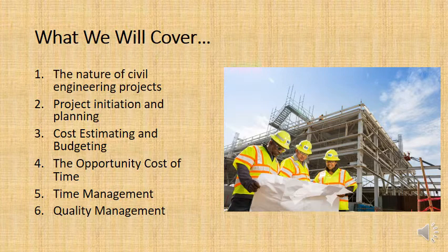And we're going to talk about time management. There's no point building a building as cheaply as possible if it takes you 5 years to build rather than 1 year, because you're losing income you could be making from that building for 4 years. There's a big opportunity cost. So time management is very important. In the same way, quality management will be a key aspect of project management that we will look at. So project management is really managing the interface of cost, time, and quality more so than anything else.